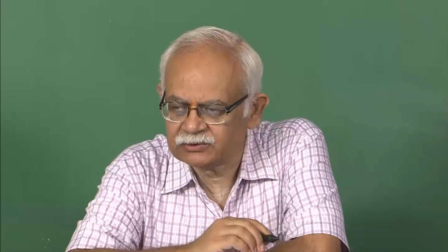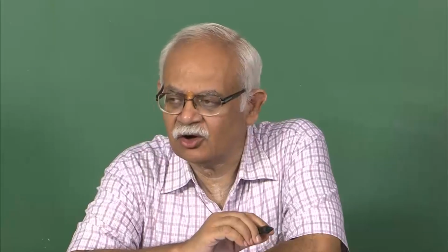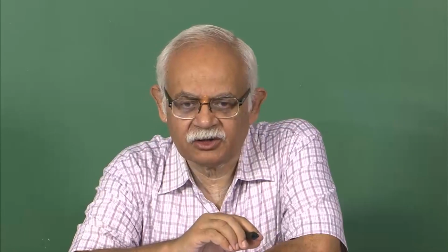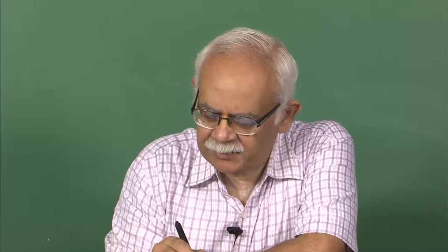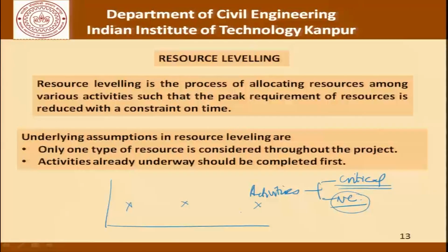So, the whole idea of resource leveling is to make sure that the resources that are used in non-critical activities are not spread out over the project sporadically. It should not happen that over a period of time I need a resource here, then I need it here, then I need it here. If possible, I would like to bring these resources such that they are used here and here, so that this particular resource can be brought to site only for this duration and be let go, provided of course that this is for non-critical activities.